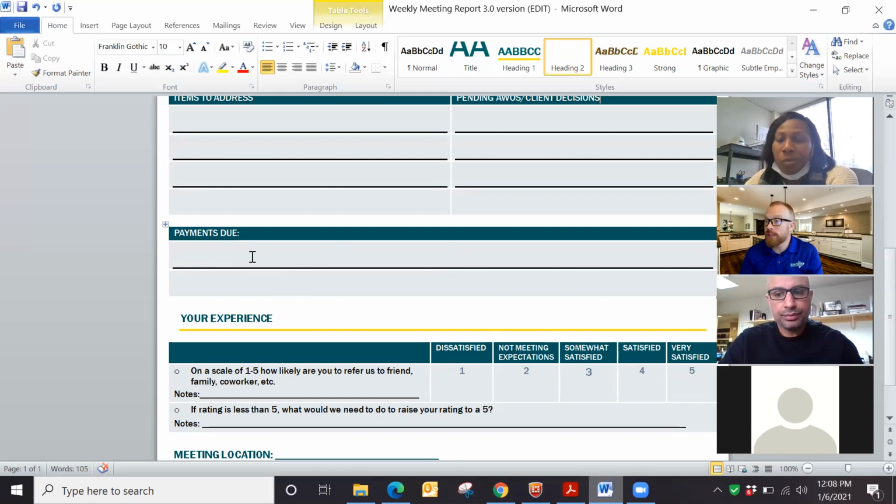So even if you're collecting, like, start of drywall, okay, I'm starting drywall now. Well, our next check is at start of trim. You should expect that in whatever the next draw is, even if the draw is like 4 weeks from now. It's on there and you just say your next draw is in 3 weeks, your next draw is in 2 weeks, your next draw is next week. And that's where we would need to look to see the additional work order.